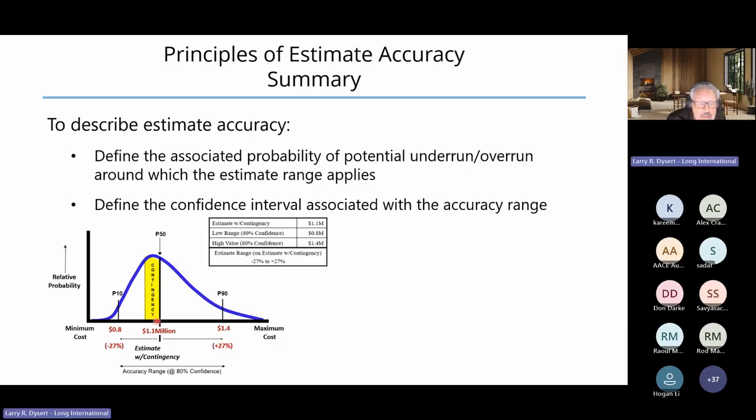We should make sure that we inform management of the uncertainty still associated with our estimate. All of this stuff over to the right, even at a P90 value, we'd have to add another 300,000 to our 1.1 million P50 value. So by funding here, we have a 50% probability of overrun. We don't know if we're going to overrun by a small amount or a large amount, but we should certainly indicate to management how significant these P70, P80, and P90 values are.